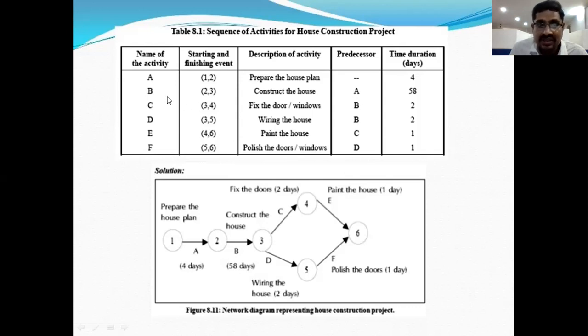Based upon these two lines, the first column and the fourth column, right? First of all, I want to draw A. Before starting to draw the network of A, we just need to check the preceding activity here. To draw A, we need to check whether it has any preceding activity. There is none. That's the meaning here: A is the self starting point.